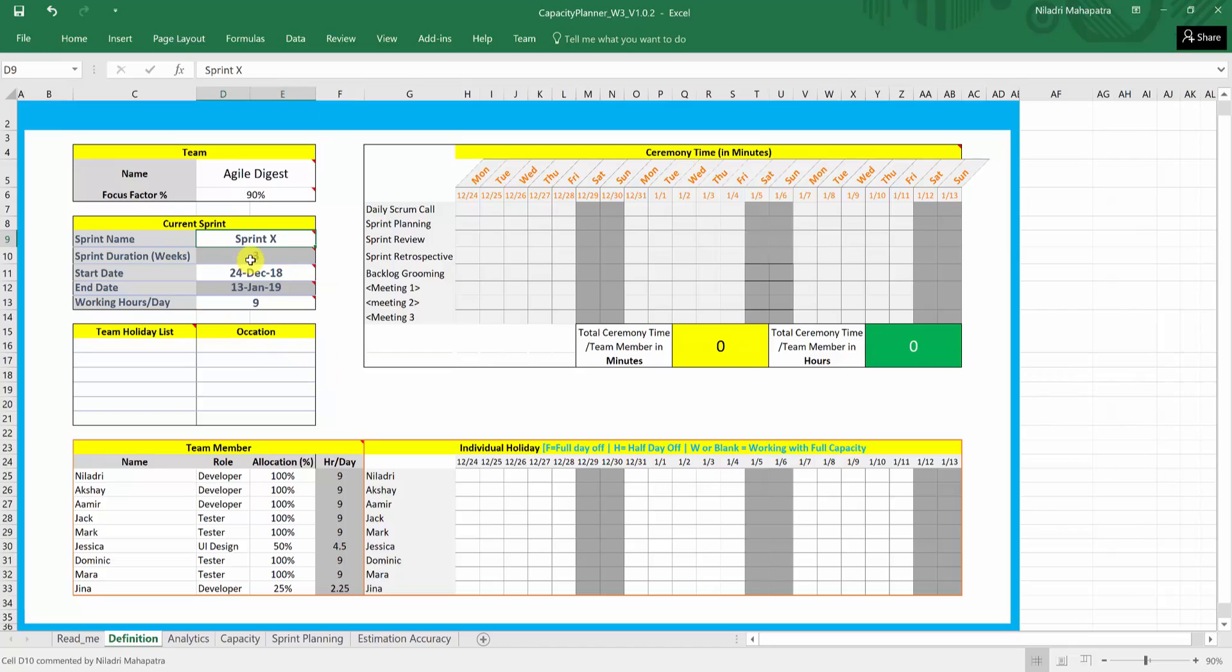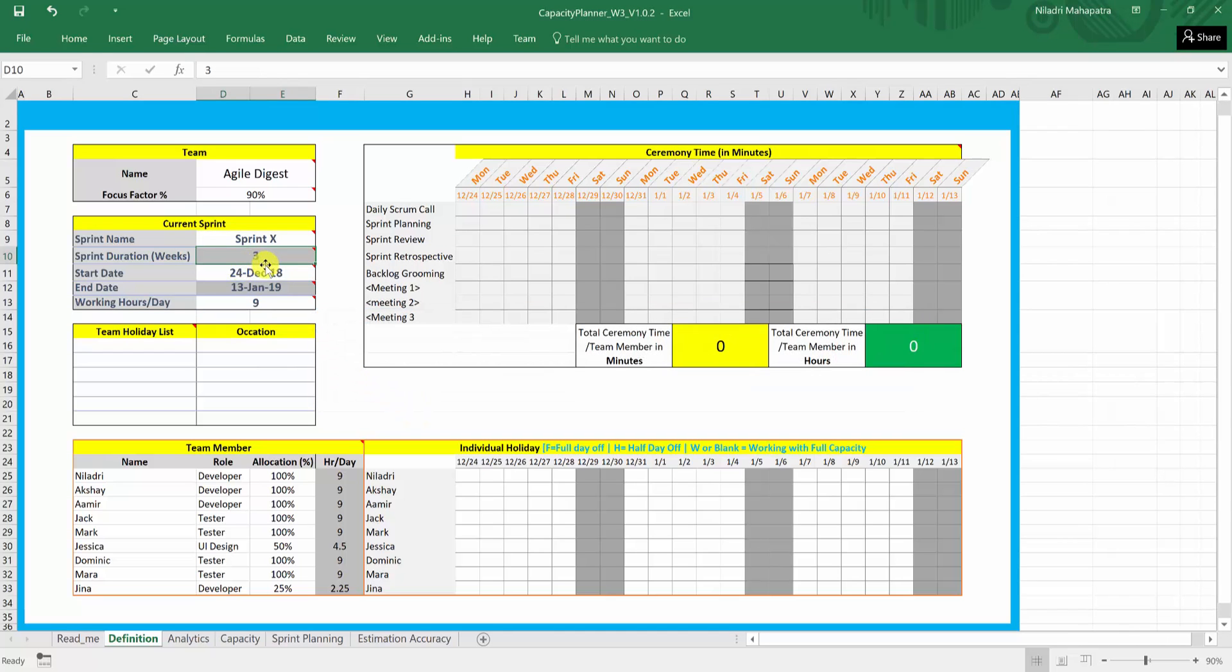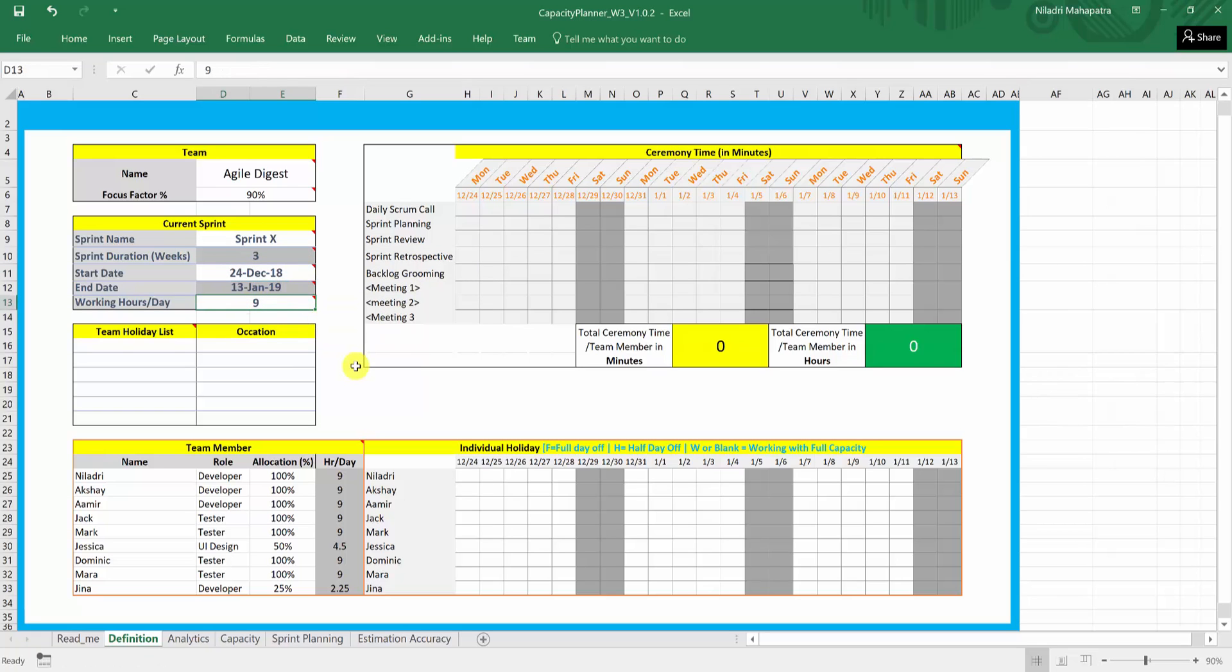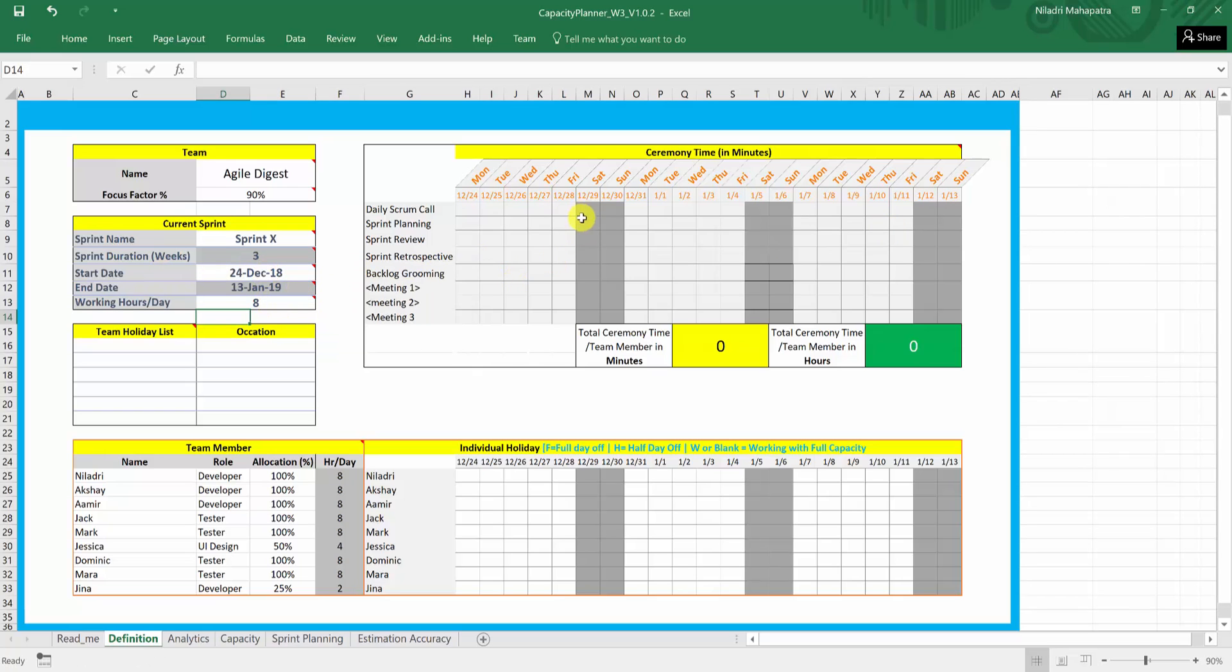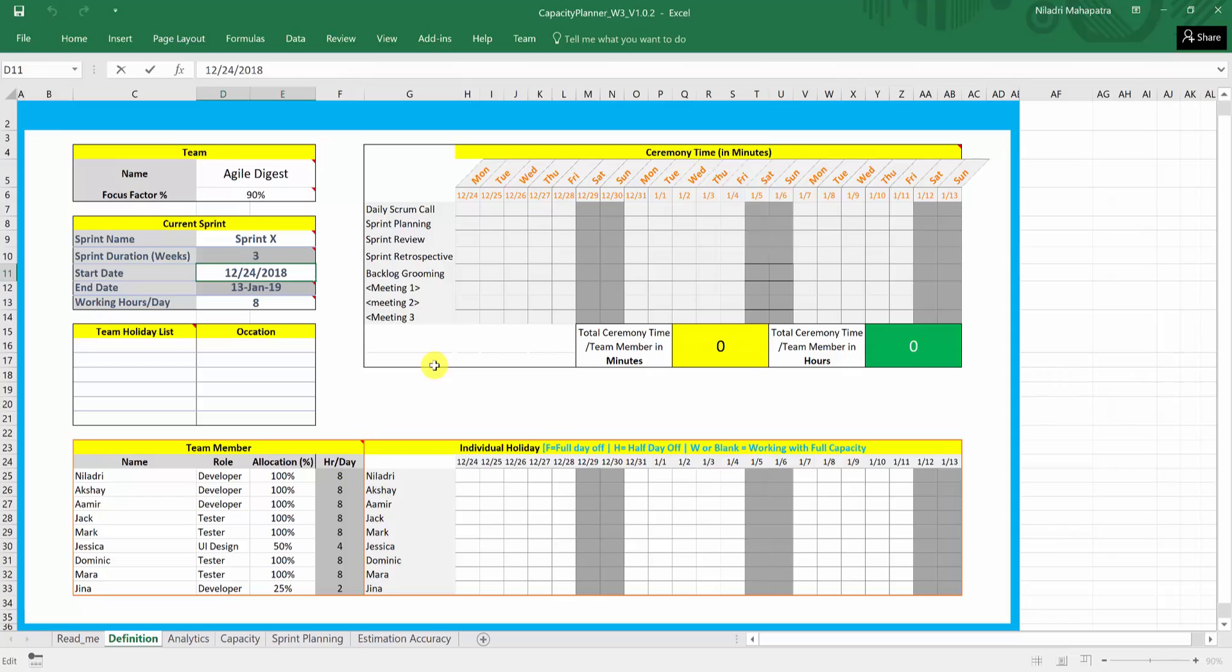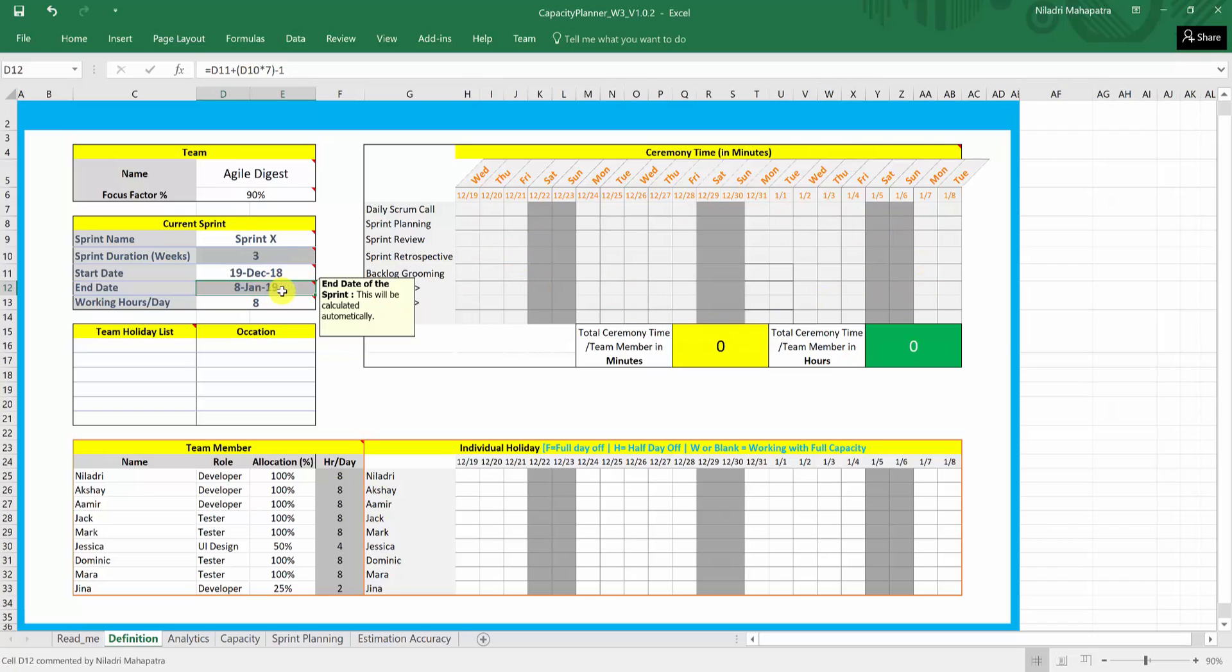The duration of the sprint, this is actually locked. You will be not able to change it. So this is a three week sprint. So if you want to go for a two week sprint, there is another template. So there are two templates for two week and three week template. Now, the start date when you sprint is starting and based on this date, end date will be defined and the working hours per day. It is nine hours as of now for this template. You can change it to eight hours as well. Now this is the area. It is actually auto-generated based on this start date and end date and this gray area is talking about those are the weekends. If you start it for an example, instead of 24th, you want to start it on 19th. Now you can see 19th is a Wednesday day. Your weekend is coming here and this will automatically change based on whatever your start date and end date is. This end date is now changed to 8th Jan because it's a three week sprint and starting on 19th ending on 8th of Jan.